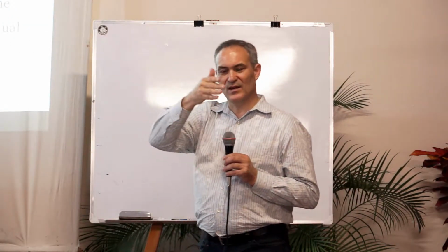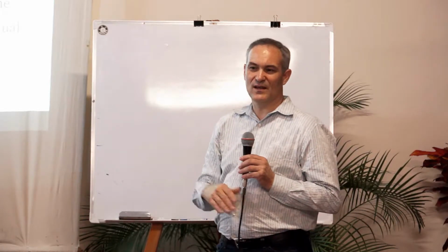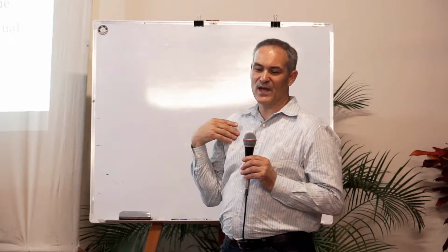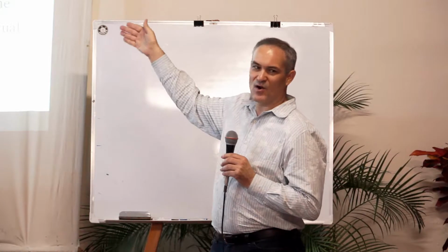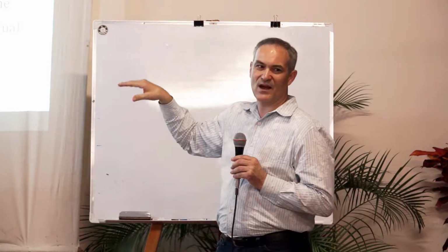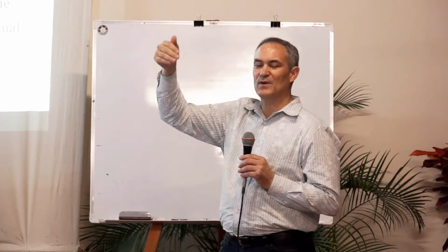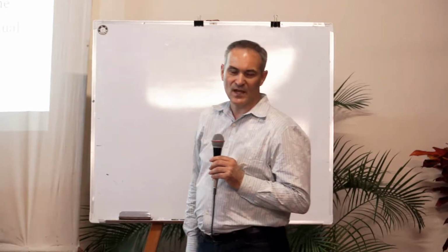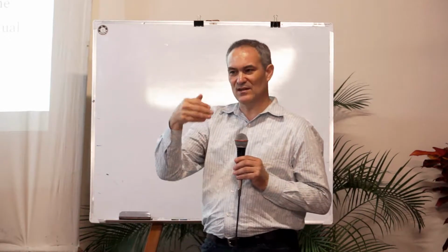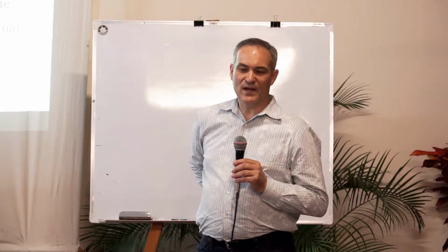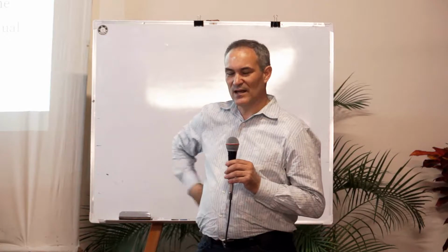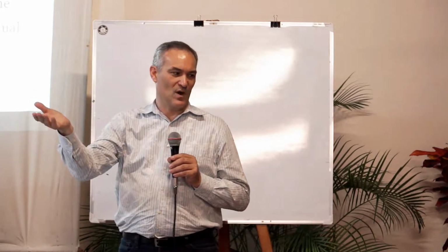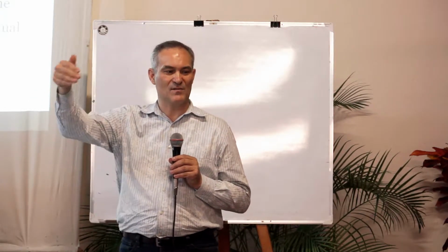Also, midway, as Sylvia said, how they manage their grants is they pay out half and wait for the interim report to see how you're tracking to that bigger goal with those objectives. Are the objectives you have measurable, and how many of those have gotten done? If they're satisfied with the progress, then the remaining part of the grant is supplied. A lot of granting agencies do that. They pay out not just one check at once, but they watch your progress and pay out over time.